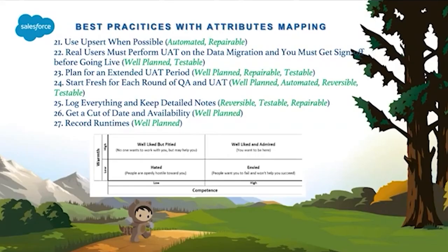And if the UAT itself happens for a 2-week or 3-week time frame, and there were multiple issues being addressed, then it is always advisable to document all the fixes, whatever we are doing, and then do one final round of refresh from production onto the UAT. Deploy all these changes one more time, do one round of final end-to-end testing before promoting to production. If the time permits and the budget permits, it is recommended to have this practice in place so that your production deployment related surprises will be avoided.